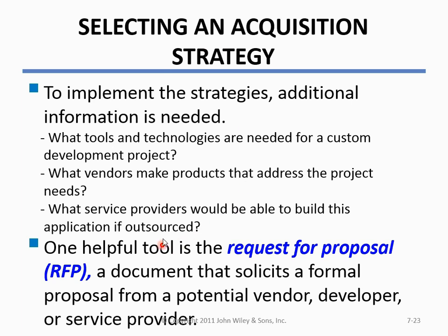Okay, how are we going to let vendors know? How are we going to discover vendors? One way to do vendor discovery, especially for a big and sometimes governmental project, is to do an RFP or an RFQ, request for quote: here's what we would like everybody to bid on. You see them in the big papers all the time. It's a nice way if you can find 2 or 3 vendors. Well, if you want to be a little bit cynical, you can play them off one against the other. Well, vendor B said they could do this for 20% less. I don't suggest you do that, but sometimes if you get 2 or 3 quotes and they're all in the same ballpark, that gives you some reasonable assurance too.